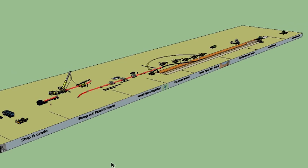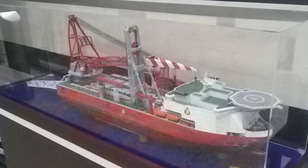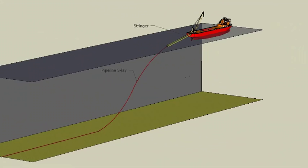Offshore Pipeline. Pipes are welded together in the boat's hull and fed out the back of the boat via a stringer as the boat moves forward. The welded pipes form an S-shape as they fall to the seabed.